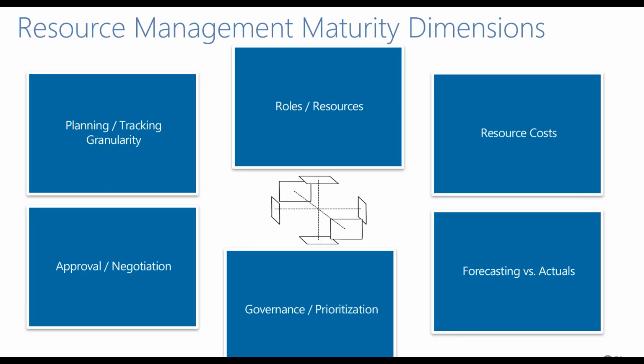Are our resources going to have inherent costs, a cost per use, a cost per unit, or a cost per hour? The idea is to track that so that we can get a resultant cost of our projects and our resource endeavors based upon the resource planning and execution that we have.